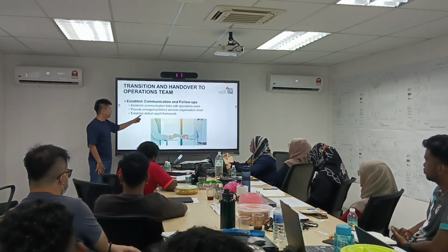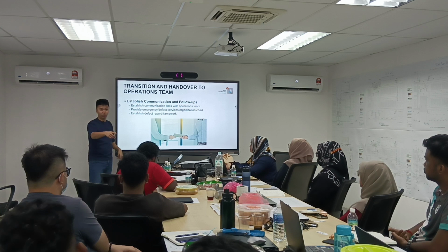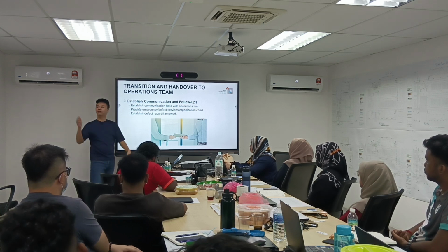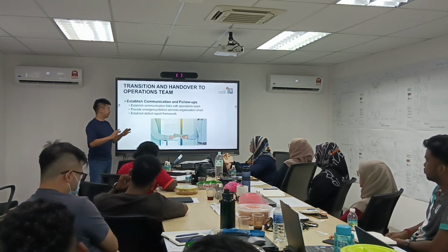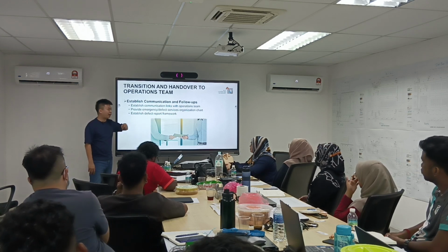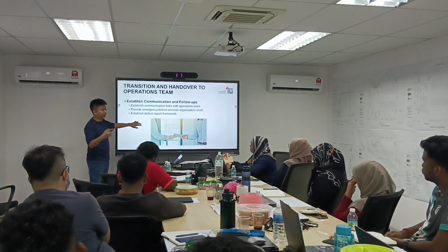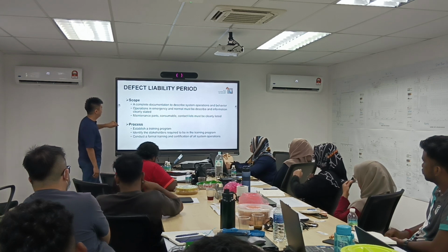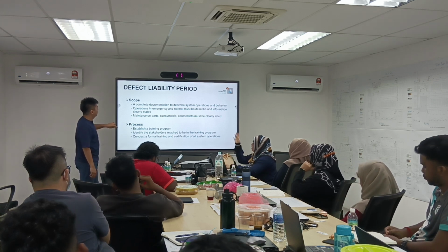Then we should establish a defect reporting framework. Like I said, WhatsApp one way, email another way, the group another way. All this is non-organized. We should establish a defect reporting framework, how we should report the defect. Then we can manage it normally.